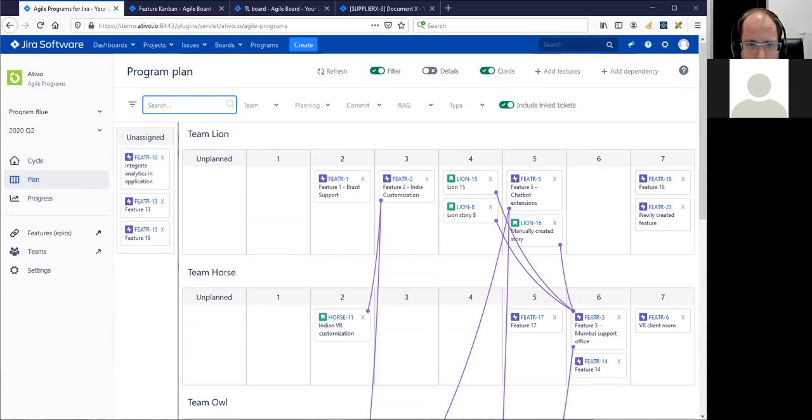We have a question from Marco. In my former project using SAFe, we created PI objectives derived from planned features, including a business value vote 1 to 10, which were reviewed and voted again in the PI system demo, Inspect and Adapt. Is this possible here? Good question. It's not possible in the tool itself because I think it works really well if you use Excel or any other tool. What you can do is set at the feature level the commitment, and that's taken into account in the metrics which you will see later.